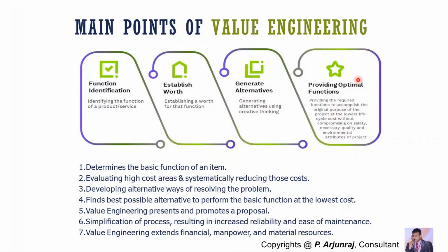Okay, so first you have to understand what is the requirement. And if it is not required, you need not provide it, and accordingly the cost can also come down. So these four aspects are very much important when you're dealing with any value engineering aspects. The first thing is that you have to identify or determine what is the basic function of the product you're going to deal with, or any process you're going to deal with. The basic function is the one which is very much important for the particular product to perform.